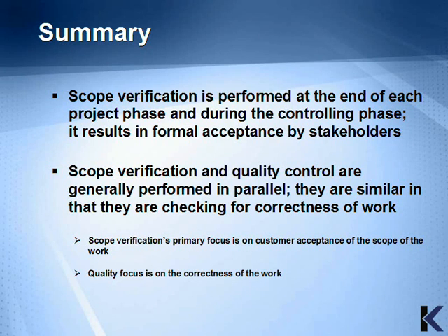And lastly, scope verification is performed at the end of each project phase and during the controlling phase. It results in formal acceptance by stakeholders. Scope verification and quality control are generally performed in parallel. They are similar in that they are checking for correctness of work. The scope verification's primary focus is on customer acceptance of the scope of the work. Quality focus is on the correctness of the work.